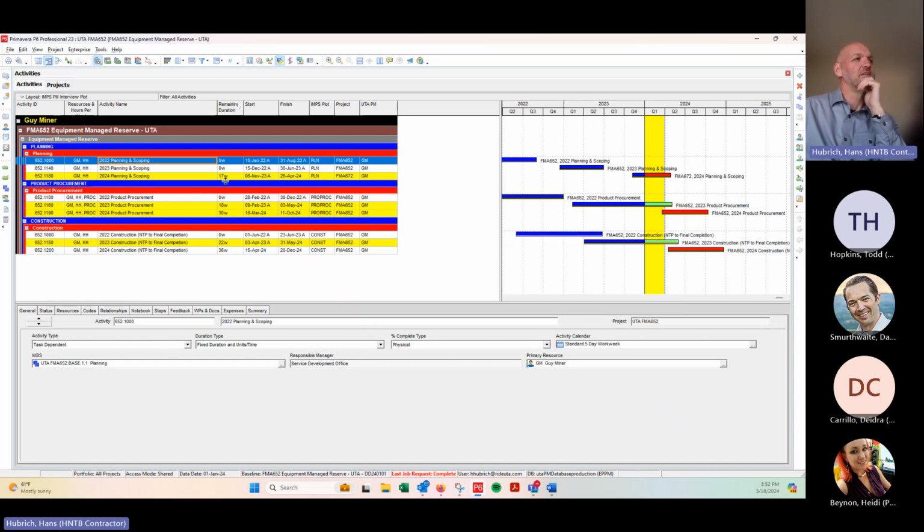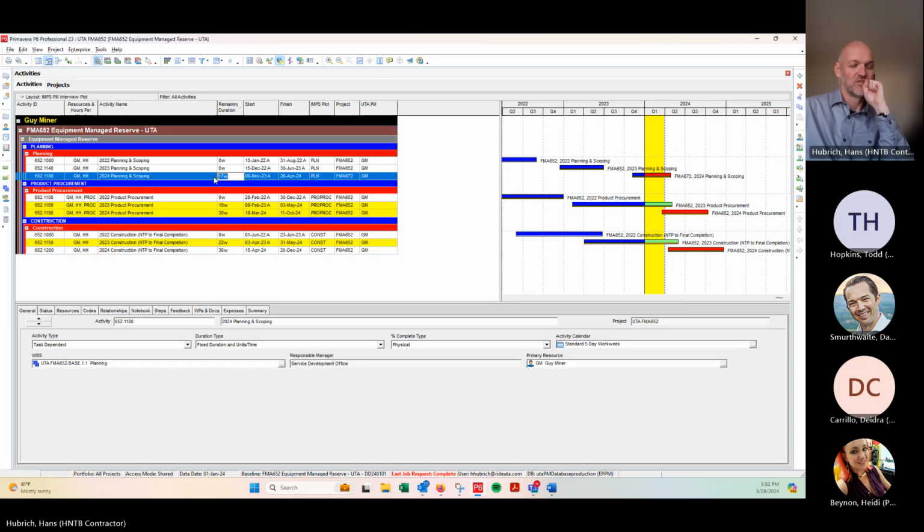So when I go in here and I say, okay, this activity has 17 weeks remaining, we just used up 6 weeks in between our last data date and this update. So I'm going to subtract 6 weeks from there. And if I don't want to change anything on this activity, I throw in 11 weeks. And now when I schedule it again, sorry, I'm speaking too quickly.